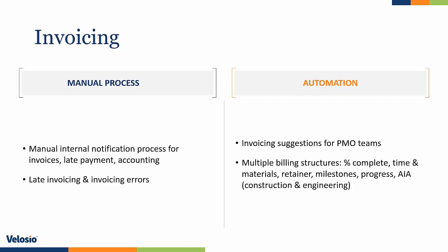However you need to do it, and then take some complexity on top of that. Maybe I have a project that is a fixed fee project, but inside that fixed fee, I've got a sub-project that may be T&M because it was an add-on or it was out of scope that was added in, whatever the case may be. Having the flexibility to do that will make your life easier and make your invoicing accurate, and that is the key.